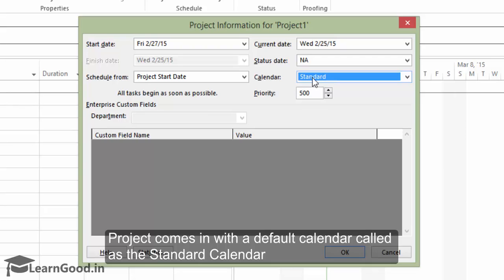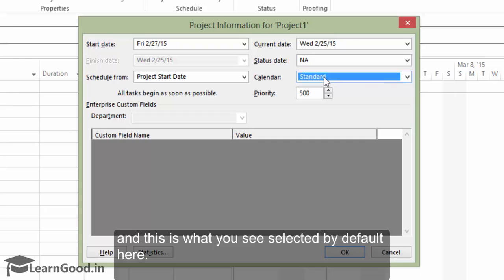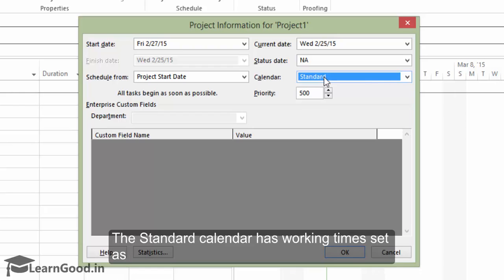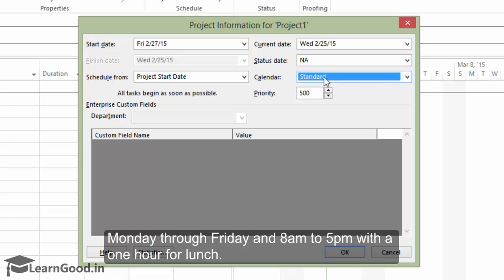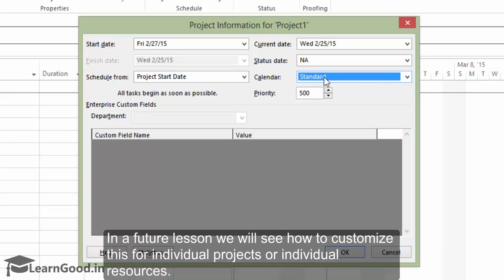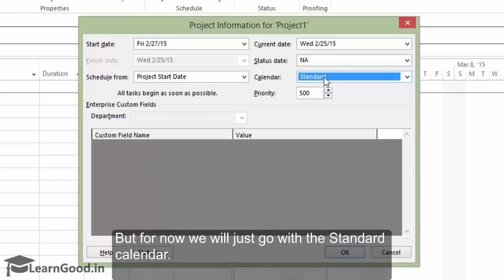Project comes with a default calendar called the standard calendar and this is what you see selected by default here. The standard calendar has working times set as Monday through Friday and 8 a.m. to 5 p.m. with one hour for lunch. In a future lesson, we will see how to customize this for individual projects or individual resources. But for now, we will just go with the standard calendar.